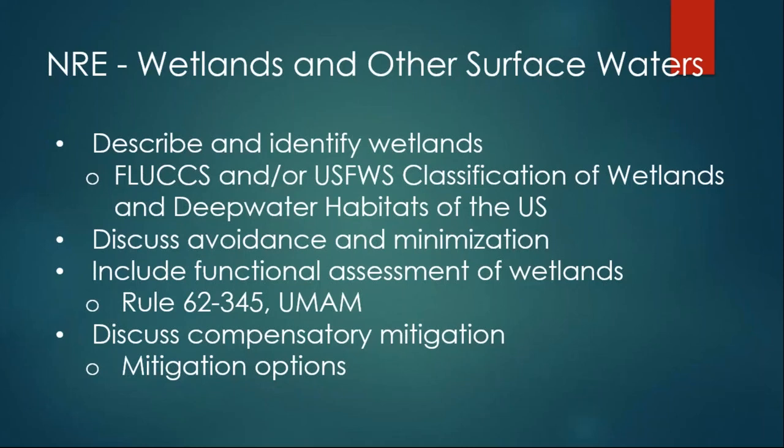Those mitigation options could be the purchase of wetland credits, working with the water management district for mitigation, and also, as a last resort, permittee-responsible mitigation, where we identify a project, an area where we build a wetland to offset wetland impacts.